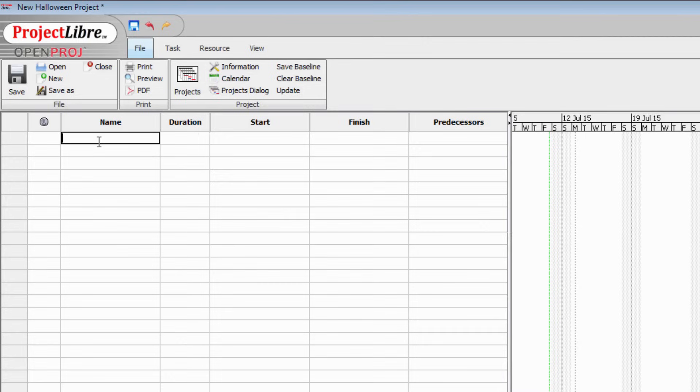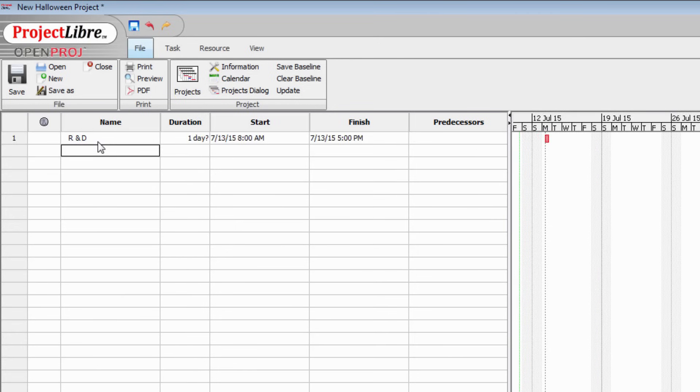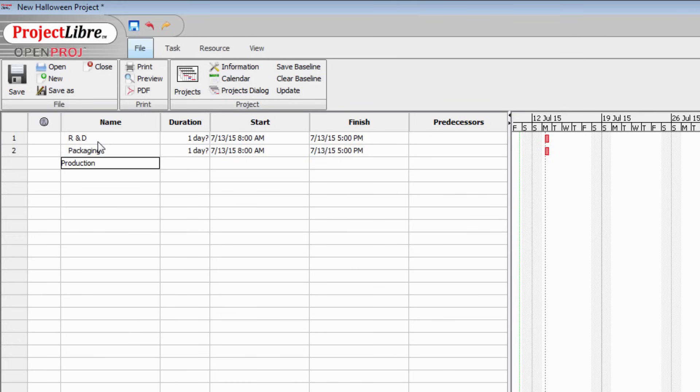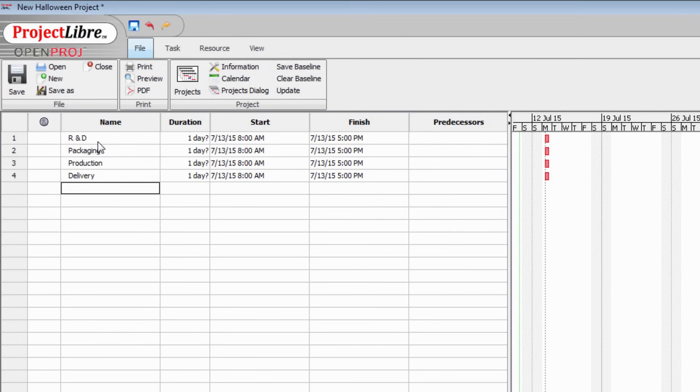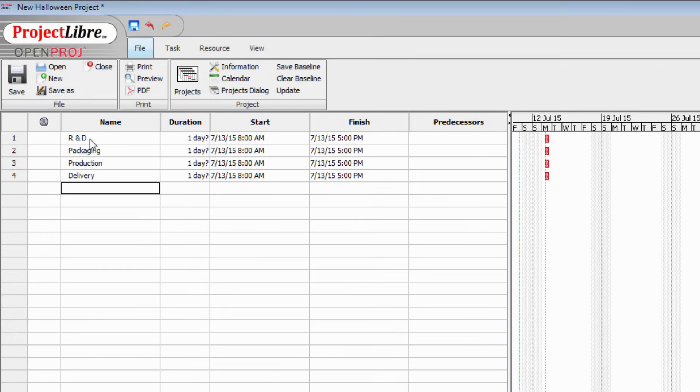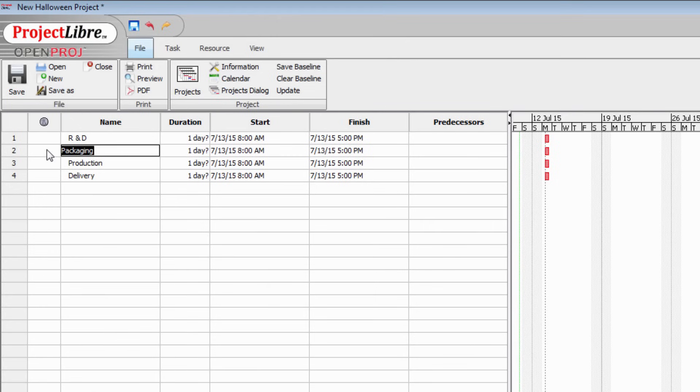From experience, we know that we have to go through a research and development phase. We need to design our packaging. We need to produce the item and then we need to ship it. These are the major tasks that we have to do but within research and development there are a number of subtasks.